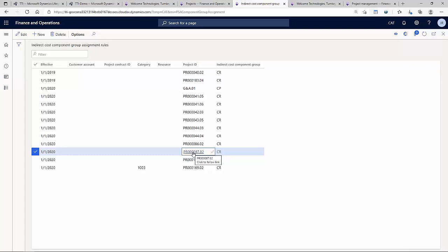So if I want to make them specific, I need to use the combination category against project and make it more specific, saying, okay, these categories are allowable and the ones that I have not listed are by default going to be unallowable categories. That's how we segregate it.